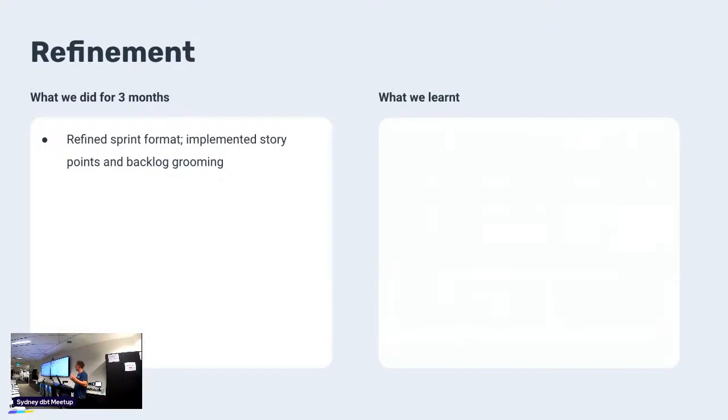And it was also very useful because, for the 15 minutes before our sprint start, people would try and assign story points. And then every now and then, they would look at the Jira task that they had created and they're like, I can't estimate this, which kind of means that the outcome or the Jira task isn't specific enough for you to actually estimate the work.